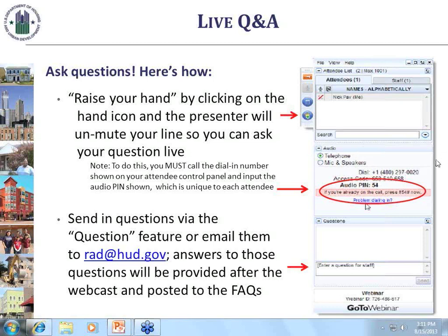Okay, and then another question, just on timing of fee issues. If a project converts, let's say this November, would it get an OCAF adjustment in January, or does it have to wait a year before the first OCAF adjustment? So no one gets an OCAF in 2013. We use the 2012 levels, and your first OCAF occurs in 2014.